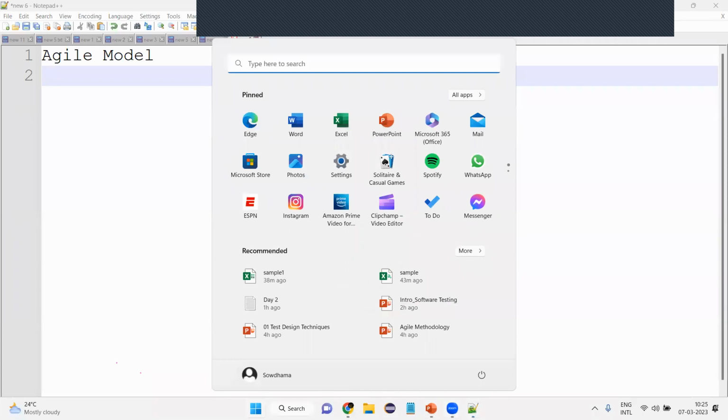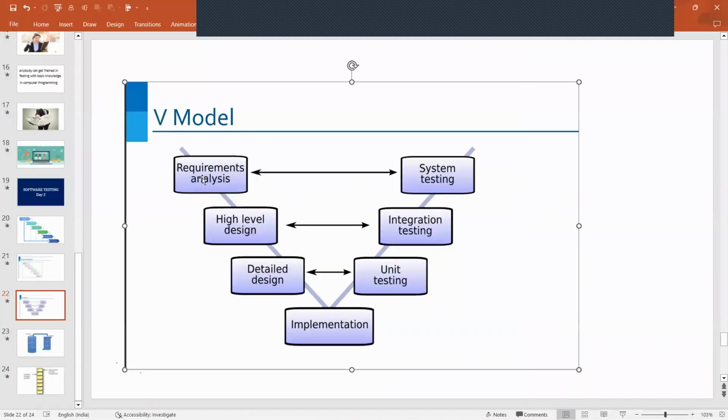Suppose some flow is happening over here. The requirements are finished, the design is frozen, and they are now doing coding. Once they are in the coding part, the client says, okay, I don't want it this way, maybe you can change the flow. We have already done almost 5 months of work, so we need to change everything. That high cost and time is required to incorporate the changes. To overcome these drawbacks of the waterfall model, the agile model was introduced in the market.